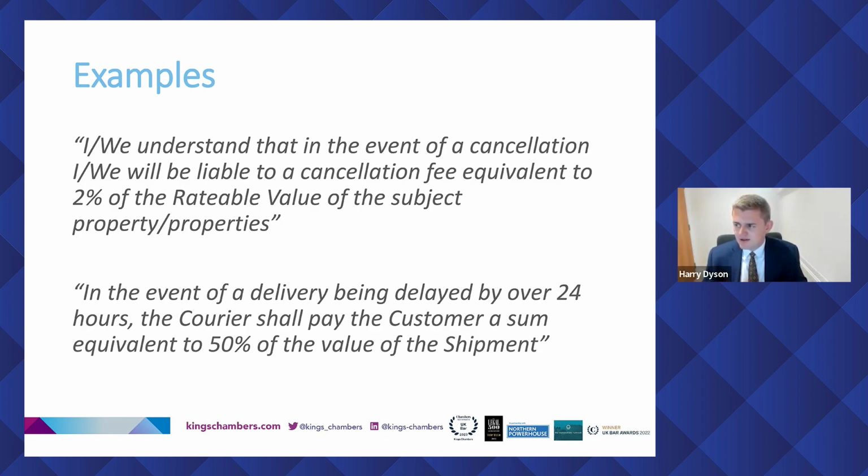The facts of the case were that the claimant failed to make any progress after a very long period of time. The defendant grew frustrated and essentially rang up, as you might expect, and said, look, we're not getting anywhere, we're cancelling, we're going down the road, and we're going to use so-and-so, your competitor. The claimant, quick as a shot, knocked up an invoice and sent it to the defendant, and that was the basis of his claim. And he relied upon the clause on the slide.